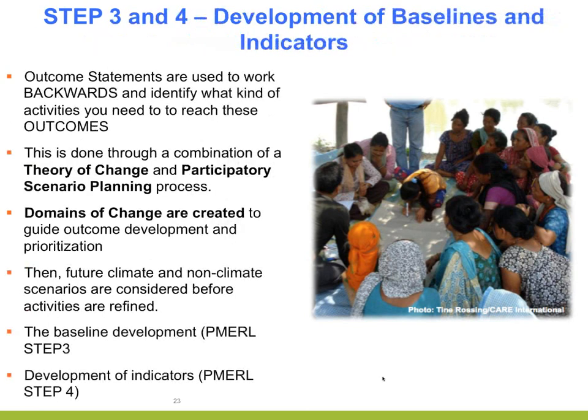Okay. Thanks, Dennis. Unfortunately, I don't have the time to go into details here with the overall process, but what you do with these outcome statements is that you, through a combination of a theory of change and a participatory scenario planning, create domains of change to guide the outcome development and prioritization. And then based on that, you work your way backwards to develop your baseline and your indicators.